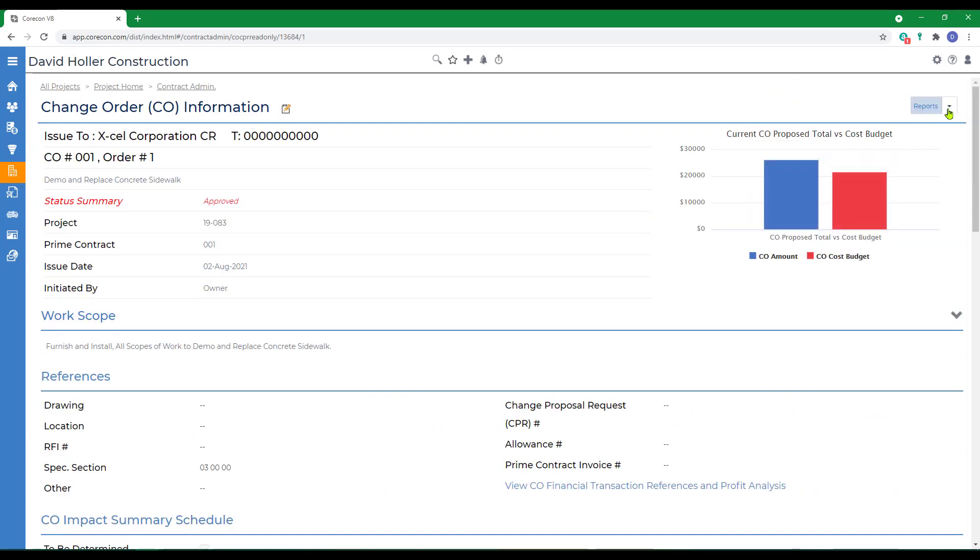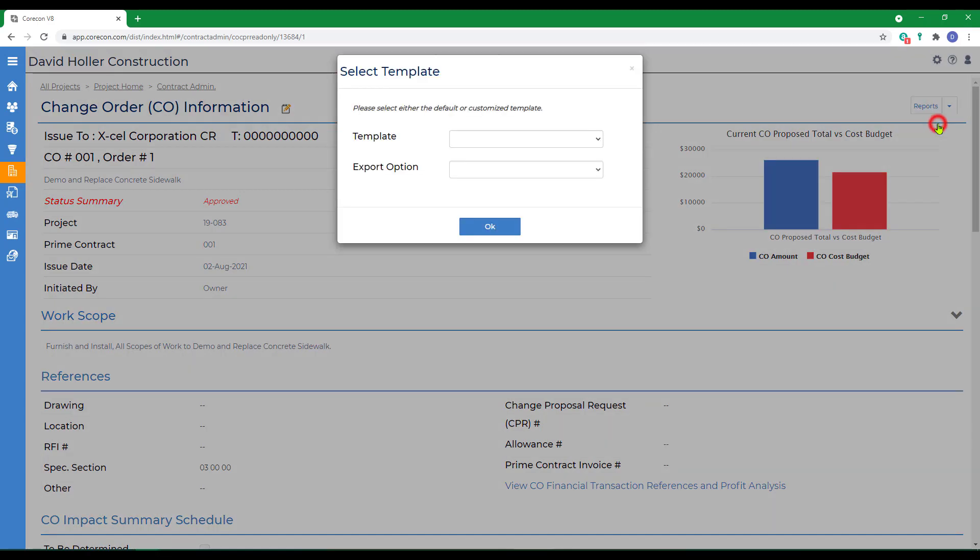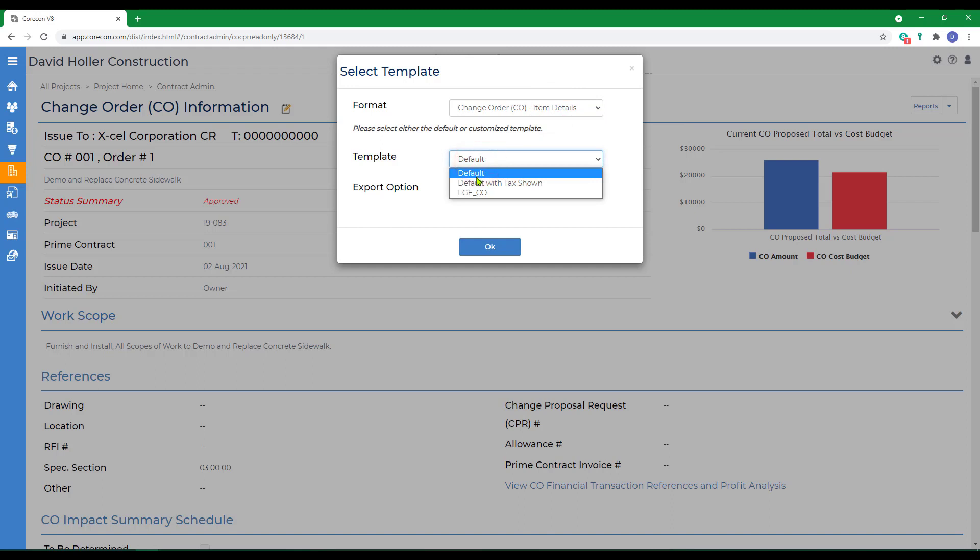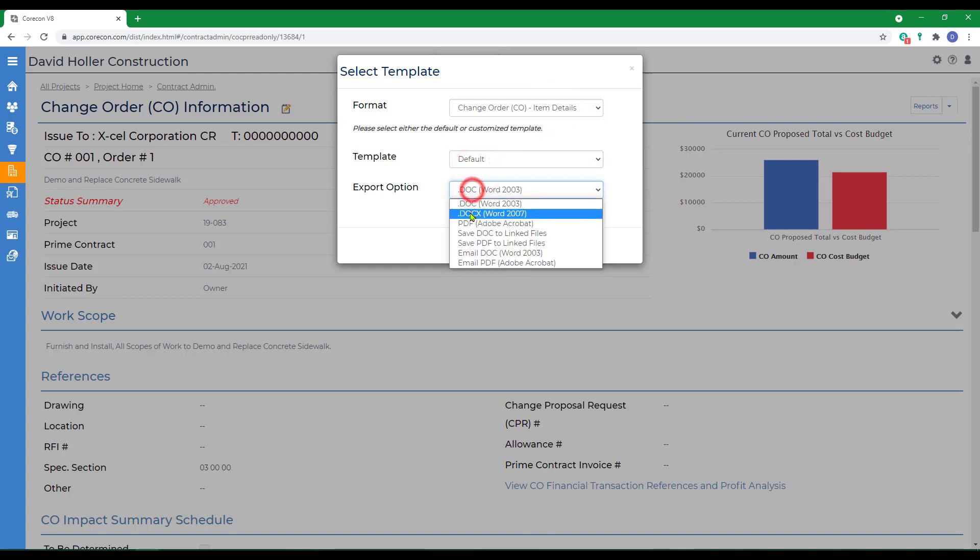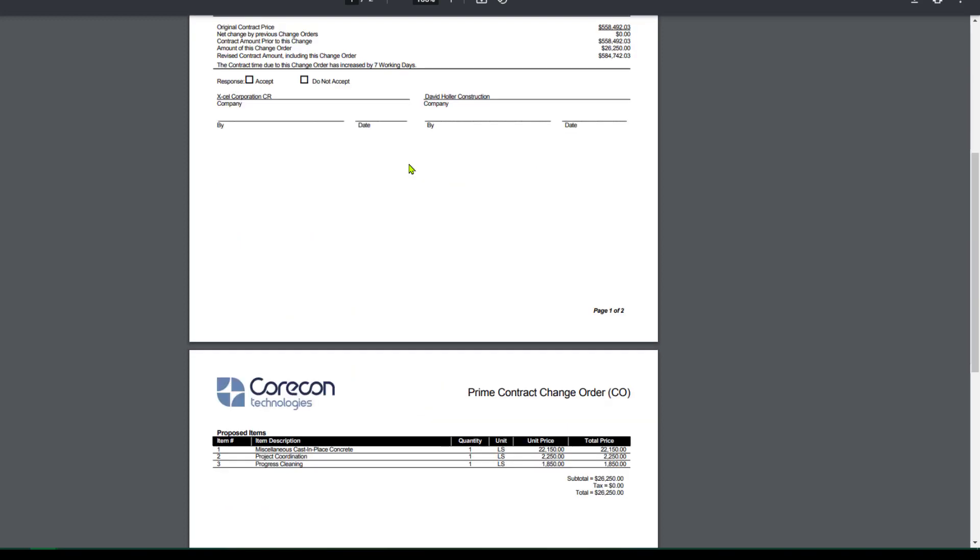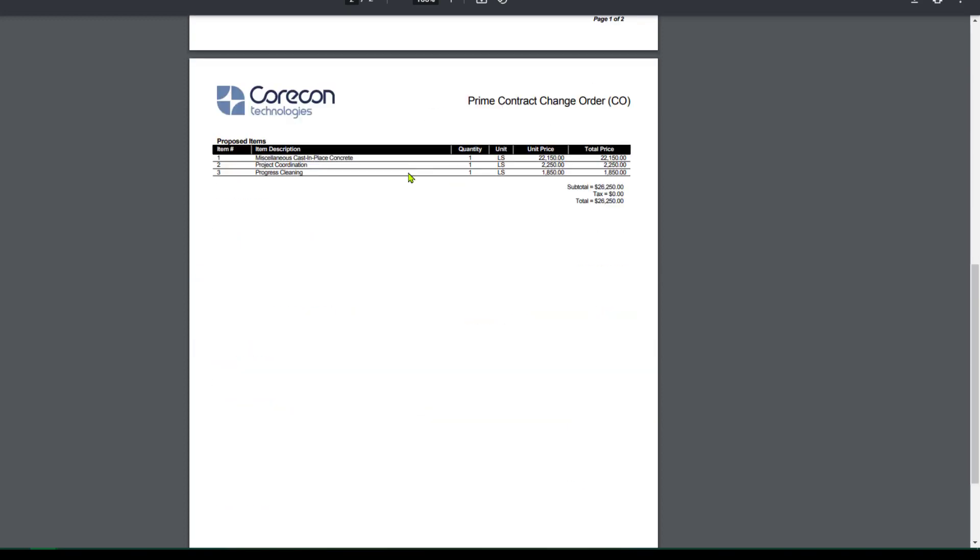Let's go to the top of this page and go to the Reports and the CO Proposal. You can see there are several ways to print this out. We're just going to choose one for now. The first page of the change order is a summary of the original contract value, any change orders that have been marked approved, and a revised contract value. There's a place to sign, the information regarding the project, the contract, and the project owner all appear at the top. The logo that appears on this change order would be your logo. The next page is the details.